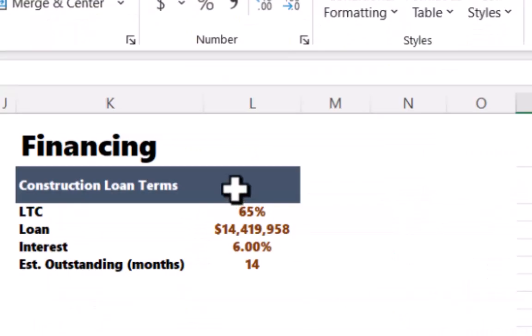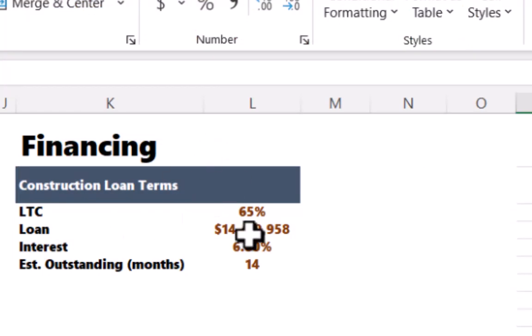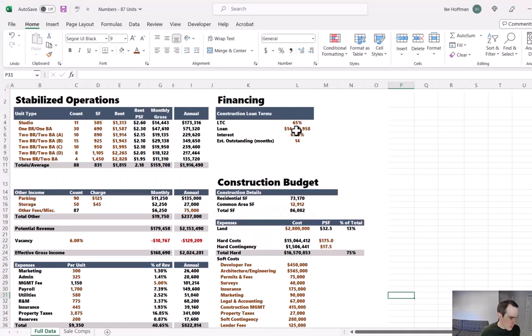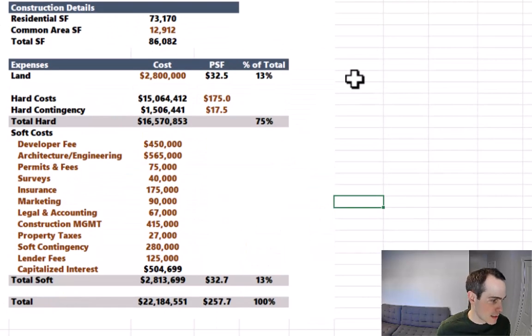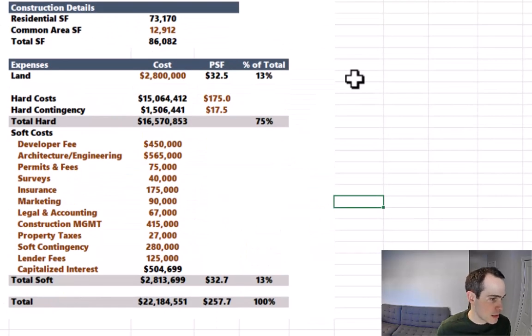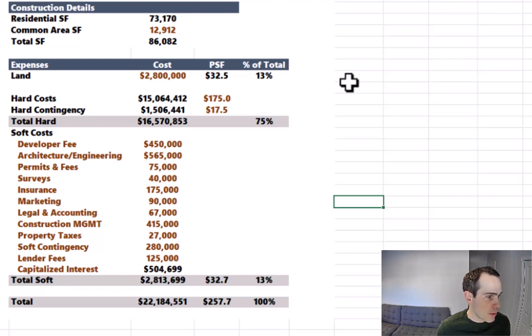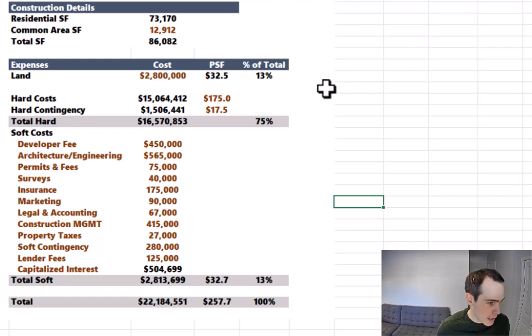We talked to a lender and got some baseline financing terms. We think we could do a 65% loan to cost loan. The interest rate on that would be 6% full term interest only, and we estimate it would be outstanding for 14 months. And then finally, we buttoned up our construction budget. We talked to architects, engineers, our general contractor, and got pretty solid bids on what a lot of the main construction cost items would be if we were to commence the project.